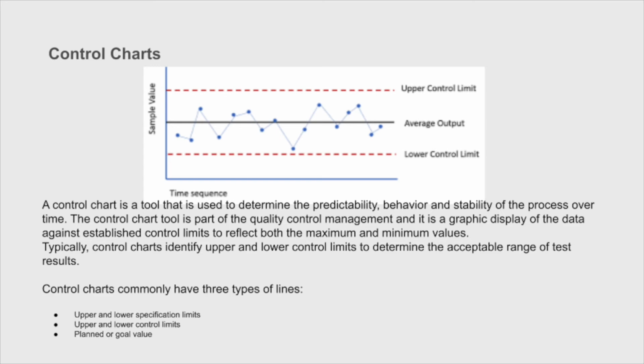And as long as the variation from the average is within the control limits, in other words, it's an acceptable level of error or acceptable level of variation, we're good. Once it goes beyond those upper or lower controls, in other words, the variation is greater, then we need to stop and assess what's going on with the product.